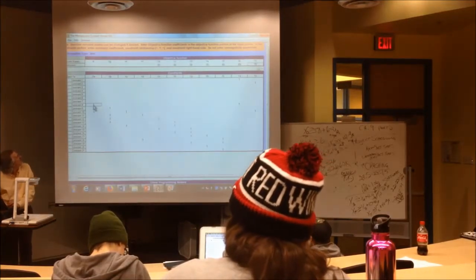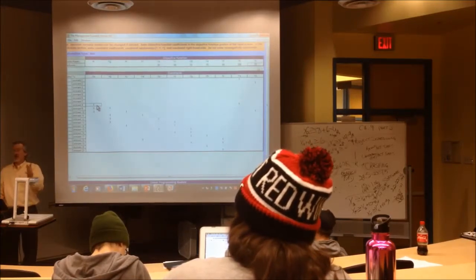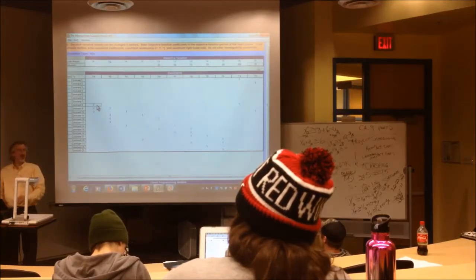So I'm on constraint 8, which is activity x sub A greater than or equal to 0. Remember, there's nothing there that we took to the other side. And then it was plus the usual time for x, which I don't remember, minus y sub A. So when we bring y sub A to the other side, is it minus or plus?